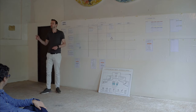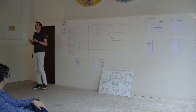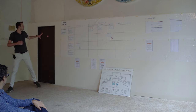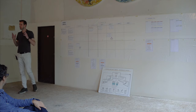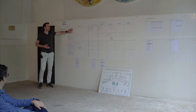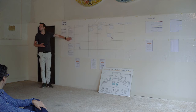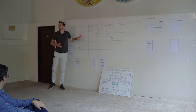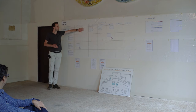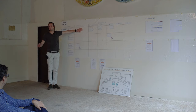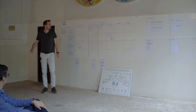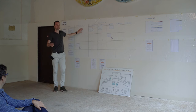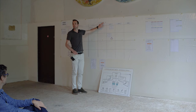This will not work for you most likely. Why not? Change is hard. One of the principles in Leading with Obeya is rhythm and routine. All five areas have their own rhythm. Lead Successful Strategies — we don't recommend too much, but usually you do that once a quarter: see whether whatever we want to achieve, are we still doing the right thing? Drive Performance we do every two weeks to see what our results are and especially where we need to learn and do better. So we do that, for example, in week one.